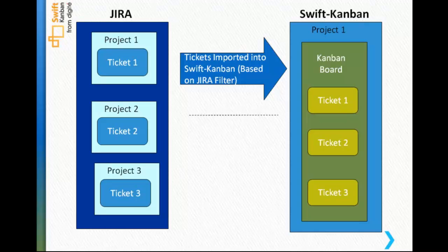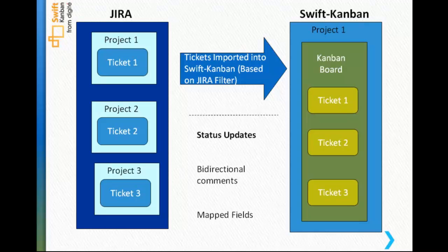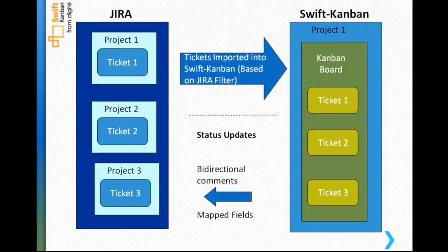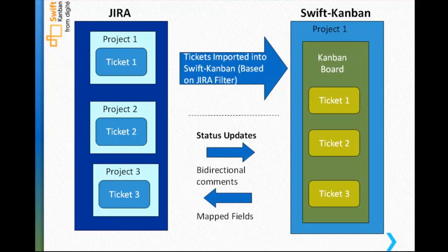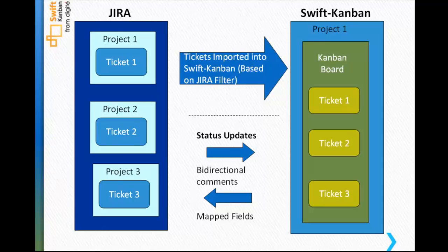As the cards progress in SwiftKanban or any updates or comments are added, corresponding tickets in Jira get updated with the status. Similarly, any new comments or description updates made in Jira also get updated for the corresponding cards in SwiftKanban. When work is completed and a card is archived in SwiftKanban, the support analyst can take any further action on the ticket in Jira to complete the lifecycle of the ticket.